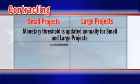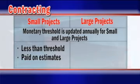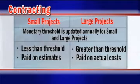If the estimated cost of a project is less than the threshold, the project is processed as a small project. The federal cost share is obligated and paid upon the project's approval. Funding for small projects is based on the initial cost estimates, not completion. The advantage of the small project is that the processing of the grant is expedited. If a project is greater than or equal to the threshold, the project is processed as a large project. Large projects are funded using a final accounting of actual costs. However, TDEM may be able to provide progress or advance payments based on submitted documentation from the applicant.